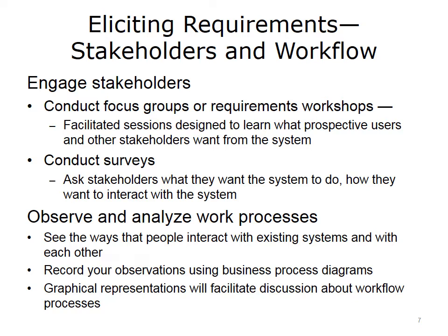Consider retaining a skilled facilitator who is not on your project team. Facilitation is a particular skill and needs to be fully understood for its value in roles like this. What is likely to emerge from focus groups and facilitated sessions is a consistent set of requirements for which there's been discussion and general agreements among the stakeholders. If you have a facilitated session, also consider designating a person to be the recorder who will capture decisions and send that information as a document to confirm everyone's understanding of what transpired.